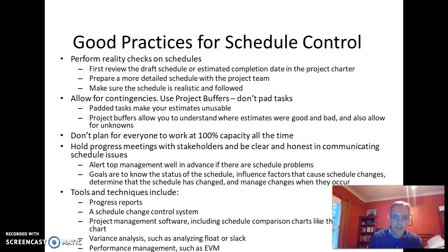Some good advice here on good schedule control: reality checks on your schedules. Allow for contingencies. Make sure you get buffers in there. Don't pad your tasks; use actual buffers, okay? Padding is a bad practice. People think, well, it's going to take me 10 days to finish, so I'm going to tell them it takes me 15. Then you just look like you don't know how to schedule. If you put buffers based on realistic estimates, then you understand over time how you're estimating your buffers, and that works out a lot better. Don't plan on everyone working 100% of the time.